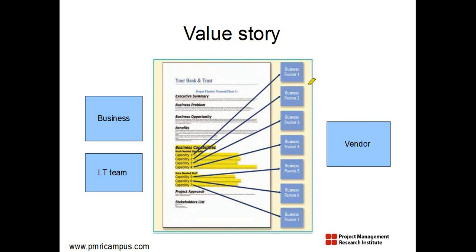And each of these value stories will have commitment dates. Okay, this should be achieved by so and so date. This should be achieved by so and so date. And this will comprise multiple sprints, and it will be built on multiple user stories as well. So for every value to be delivered, there will be a value story, and every value story will have a start date and an end date, and all your sprints, everything will be planned within this.